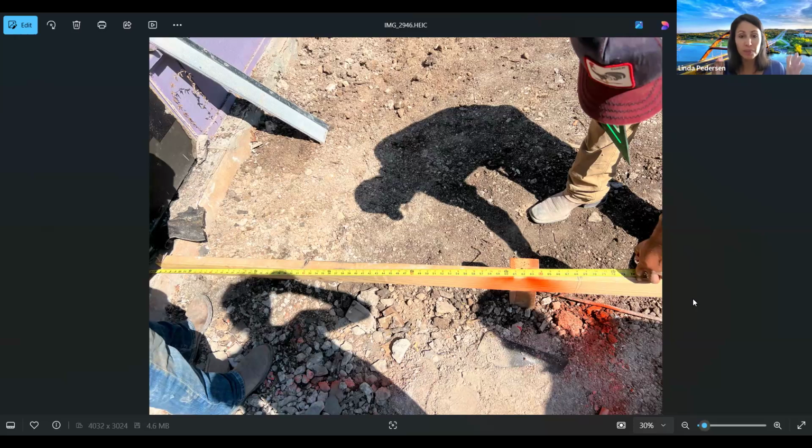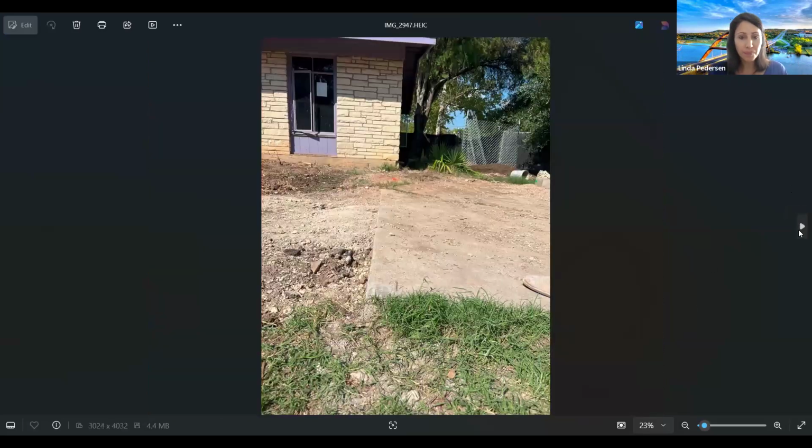So this was the front door going in. When they started at the outside, the most critical part is you've got your lot line and you've got your easement. Well, you can't build in the easement. So we had to make sure that we could for sure be square with that. Then we started building the frame from the lot line to the house, and as we got to the house, it wasn't exactly as it was on paper. So this was us measuring, making decisions as we're doing construction. And that's why you have to be out there routinely.